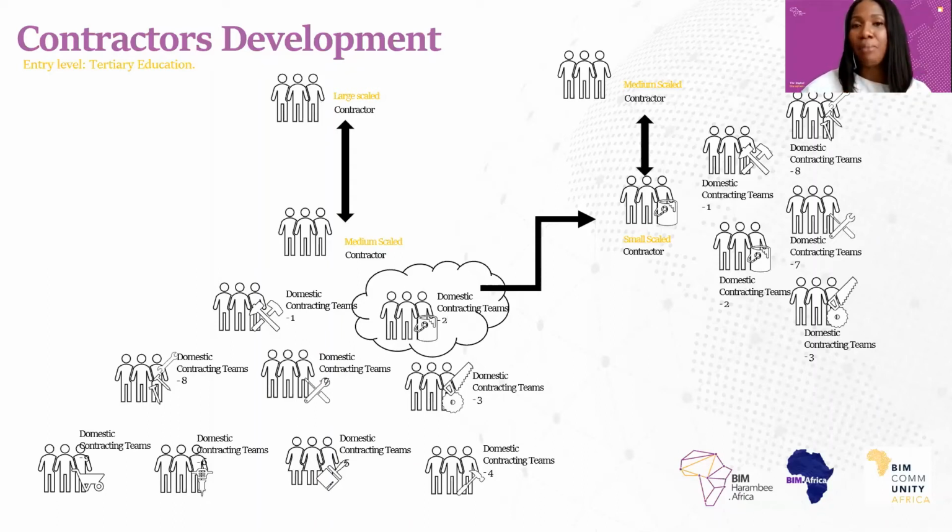So what usually would happen in certain African countries, in certain West African and probably Central African countries, is that the client will procure an architect to do the design. And the client then becomes the project manager and the QS, and they go ahead and procure the different trades, or different parts of the construction that need to happen, by themselves. And these projects could take anything from 1 year to 10, 15, 20 years, depending on how the cash flow of the client goes and how urgently they need this building.